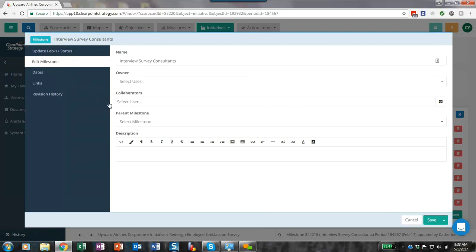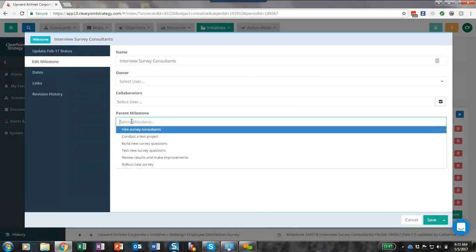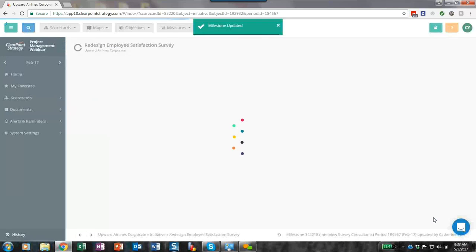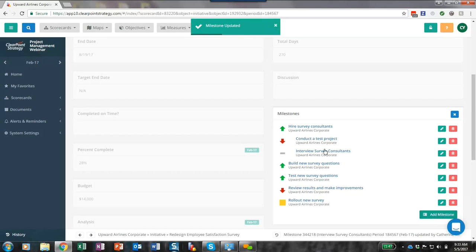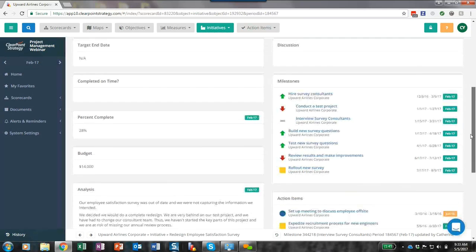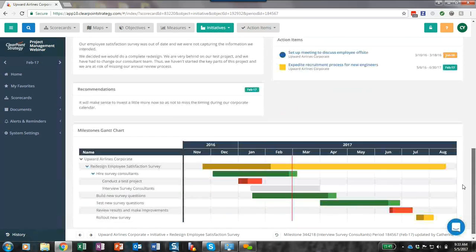So on our edit milestone tab, we can add a parent milestone, hire survey consultants, and when I save this milestone, now we can see here that our milestone is indented underneath hire survey consultants, along with our other milestone, conducted test project. So this is one way to view this parent-child relationship.